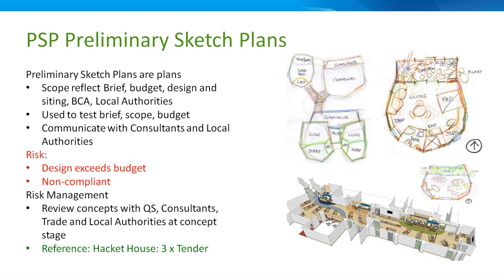So we told them that, and then it came back and we got it costed, and then the job died and it got shifted. So we're now documenting it for the third time with a third set of fees, because we know how to scope fees and services now. And then we said this still exceeds your budget. And we put it in writing: this project is approximately this cost. Why? Because don't rely on a phone call.